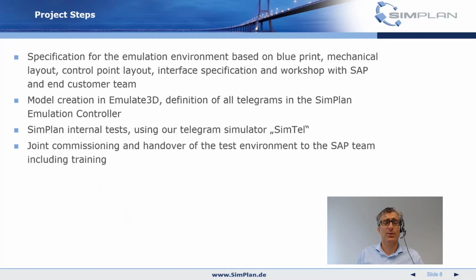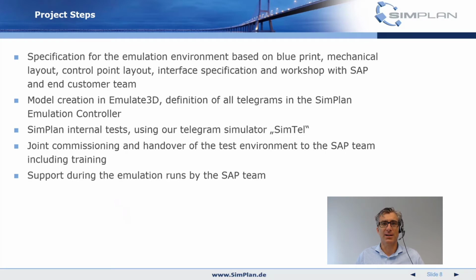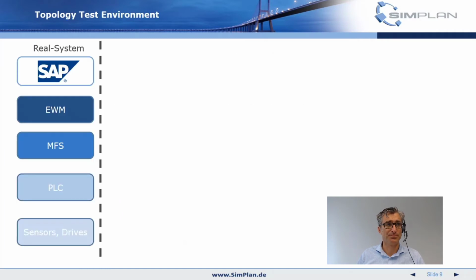After that, we did the first test runs, emulation runs, together with the SAP team. So we basically commissioned the whole test environment, trained them, and handed over the test environment. After that, it was up to them to do all the test scenarios. They basically only called us when they saw any issues they couldn't explain themselves. But apart from that, it was up to them.